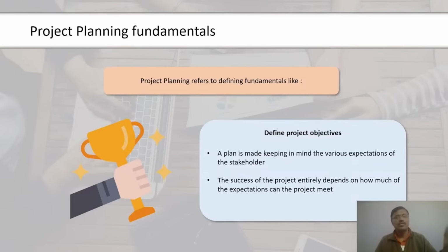When the successor activity has to wait for a few days after the predecessor activity has been completed, it is considered lag. For example, one needs to wait for 2 days for the foundation to settle before work on the pillars for the next floor starts.